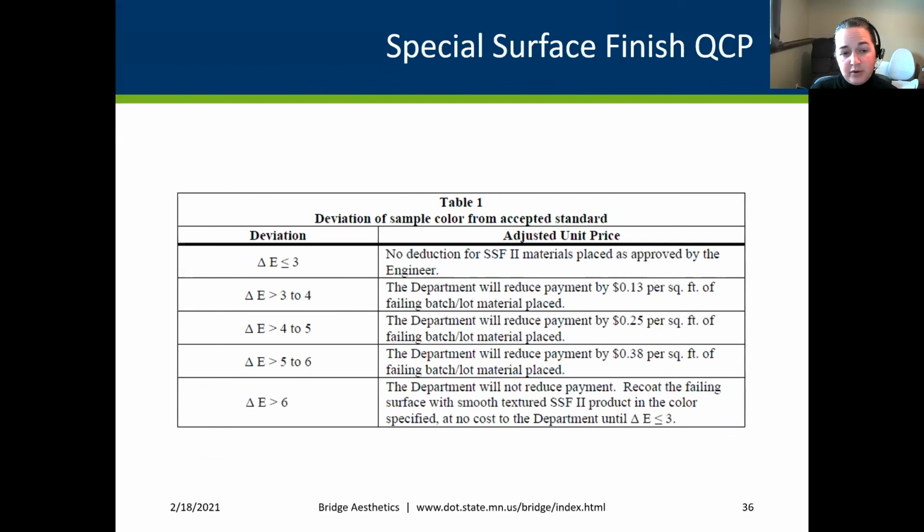So what we're measuring is we're going out there now and looking at the colors and the delta Es. They'll hold up a gun and measure it, and it'll give us the delta E, which is how different that is from the color it's supposed to be. That can tell us if there are any problems with the product. We aren't concerned because in some of these cases, our eyes could not even tell this delta E difference. But that is the easiest thing that we can measure to figure out if there's something wrong with the product, if it was cut with water, if it wasn't properly mixed, whatever it might be. It'll give us a better product in the long run.